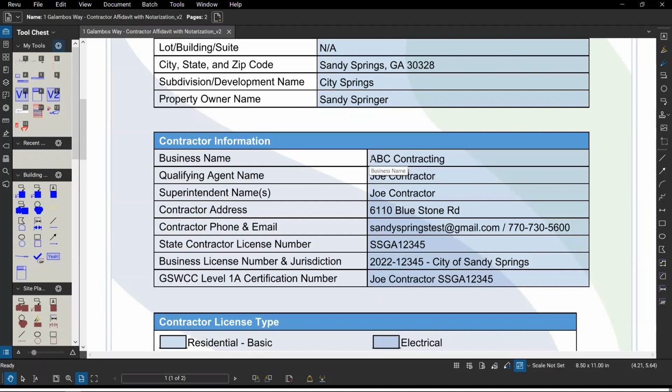So the question was, when I resubmitted those drawings, there was a little toggle at the bottom right. I can't go back into it because it locks after we submit. But there's a toggle at the bottom right that says, do you have any additional documents you want to upload? You just toggle it, and then the new blue box comes up, and you just add your files. Say, hey, it's an engineering report, and you just attach it. Because maybe one of the comments might be, hey, I need you to give me your soil infiltration report from your geotech, for things like that.